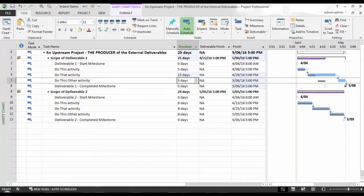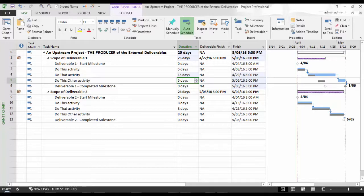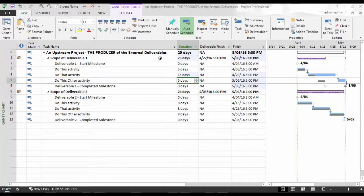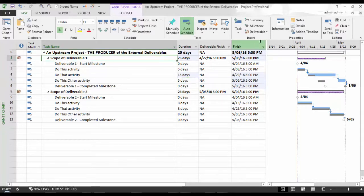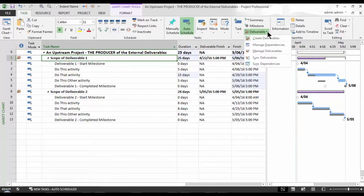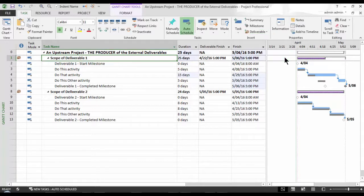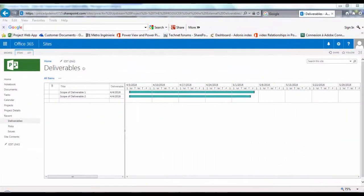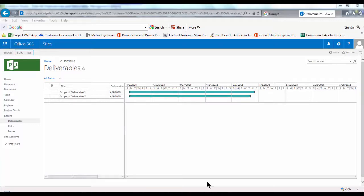Otherwise, I will do my best with corrective actions as a good project manager should to meet his or her project commitments. If it becomes apparent that this date can no longer be achieved and the PMO agrees and approves that it should be set to a new and realistic commitment date, only then should it be updated. And this would typically include the baseline as well as the deliverable dates. To update the deliverable dates of the Upstream producer file, I will select the affected deliverable, which is Deliverable 1 on row 1, and then click Sync Deliverables from the Deliverable menu. Notice the purple bar extend to May 6th. Let's see the project site to see the updates there too. Yep, it's updated accordingly.